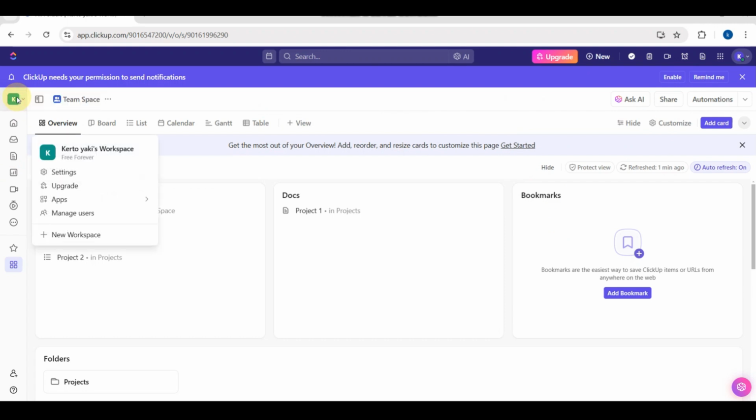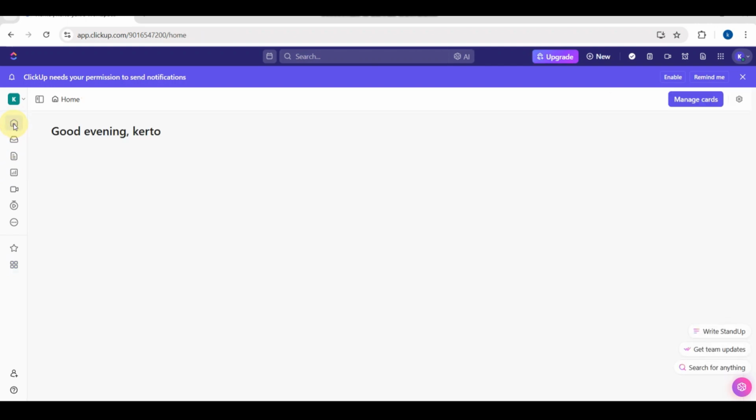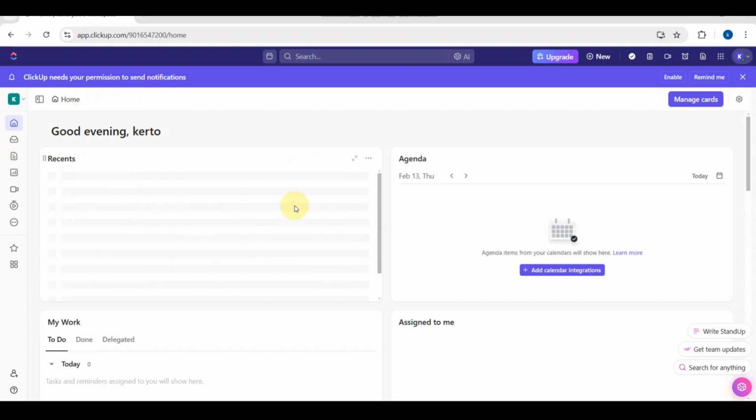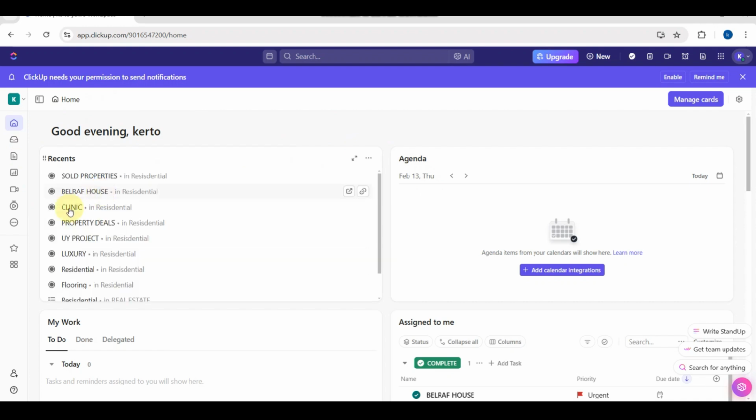So there guys, there are types of ClickUp templates. You can use space templates. So here, it is a full workspace setup, so this is very ideal for larger projects. And when we say folder templates, this is group lists for specific projects. And here in list template guys, this is very perfect for task management and tracking.